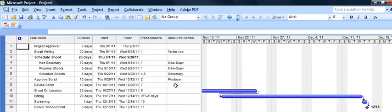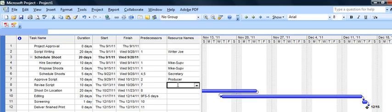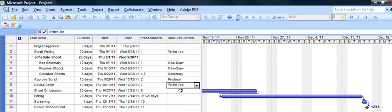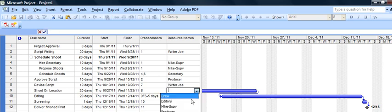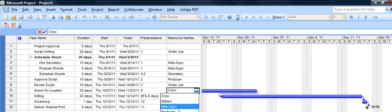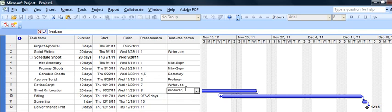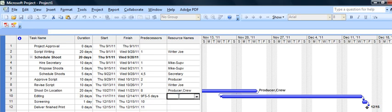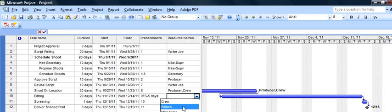We'll go back to our Gantt chart and finish out our resources. Revise the script will be our writer Joe. Now I don't want to type that in because it'll create a new person if I make any type of error. Writer Joe's down here hidden so we'll choose him. Shoot on location will be the crew as well as the producer. I think we have to put a comma in here to get two of them and put the crew in. And editing will be our editors.